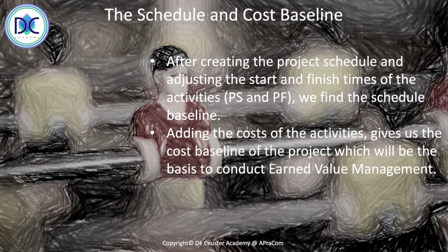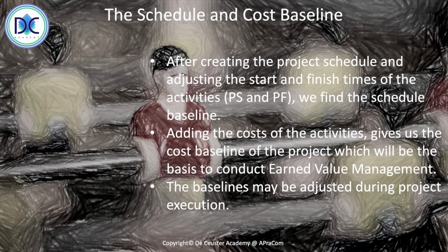And what we're going to do here is that we add the cost of the activities, which creates the cost baseline. And the cost baseline will be the basis to conduct earned value management. It is clear that when we work on a project, changes may happen, or delays, or activities are going faster. So we may have to see how this is influencing the baseline.